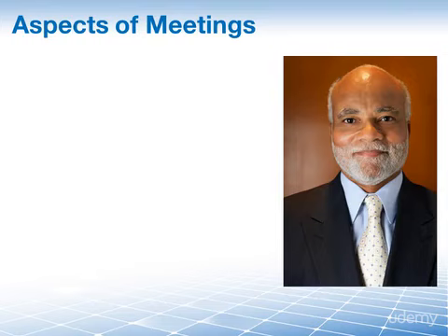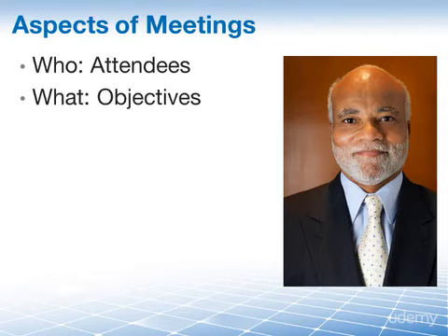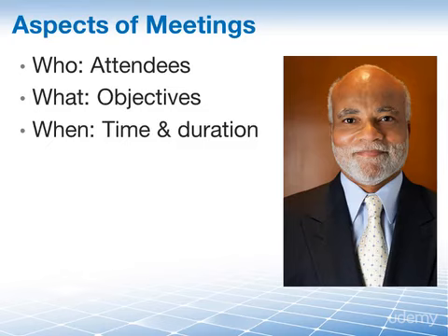Who, what, when, where, and how. Okay, the last one is an H, but there's a W in there. You'll get the idea. All right, so who to invite, who must attend, who is optional, who will facilitate or chair the meetings. This is one of the first aspects of your meeting that you have to go and consider. Then you have to think about what are you trying to accomplish? What is the goal of your meeting? When should you hold the meeting? A 15-minute daily stand-up meeting in the morning could work for one project for a particular purpose, but may not apply to all projects and serve all purposes.